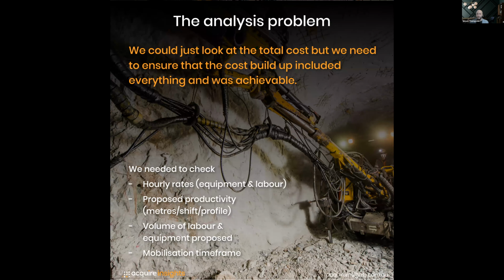Okay, so the analysis problem. We could have just looked at the total costs, but we needed to ensure that the cost build-up included everything and was actually achievable. So it wasn't just looking at who was the cheapest overall, or at the different sections, such as mobilization cost, demobilization cost, cost per ton, and so forth. We wanted to look into the details to make sure they were providing something that's actually relevant and achievable.